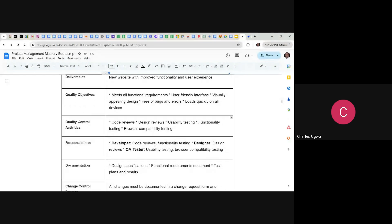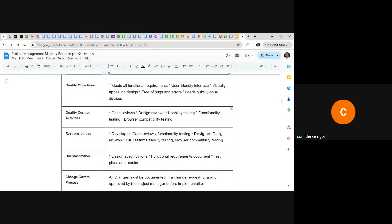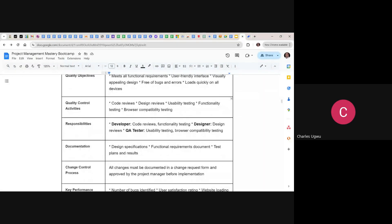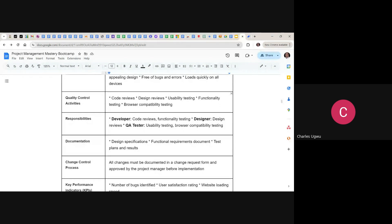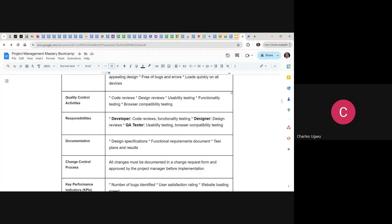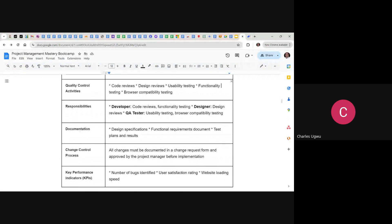Then you need to decide on quality control mechanisms or activities to make sure that quality is maintained. These include: code review, design review, usability testing, functionality testing, and browser compatibility testing. You also need to set the responsibility for each of these activities.